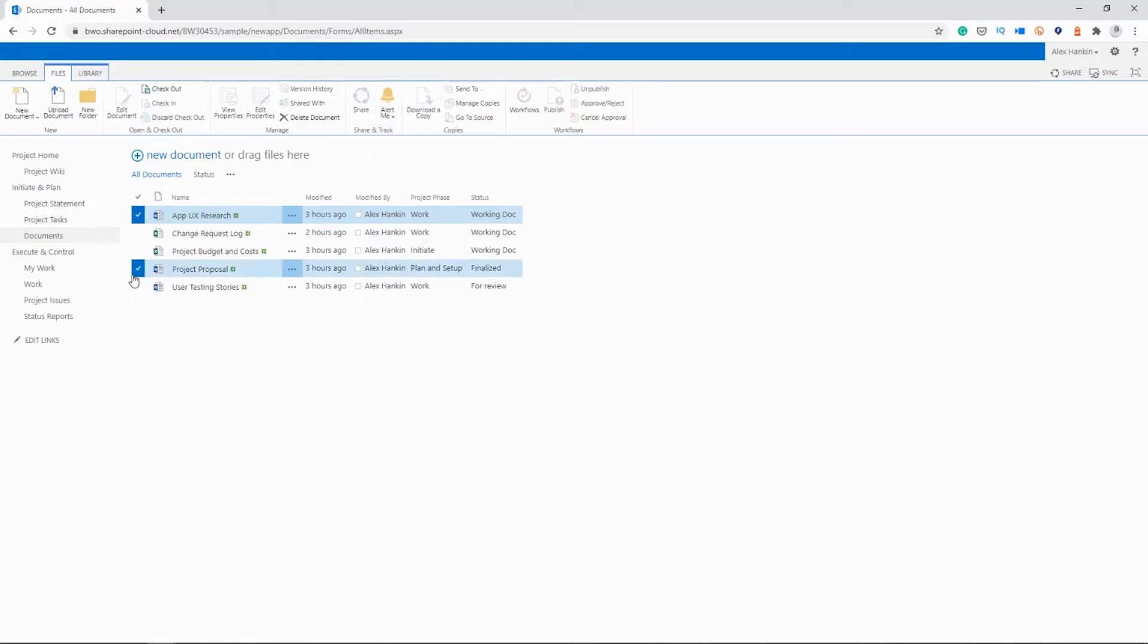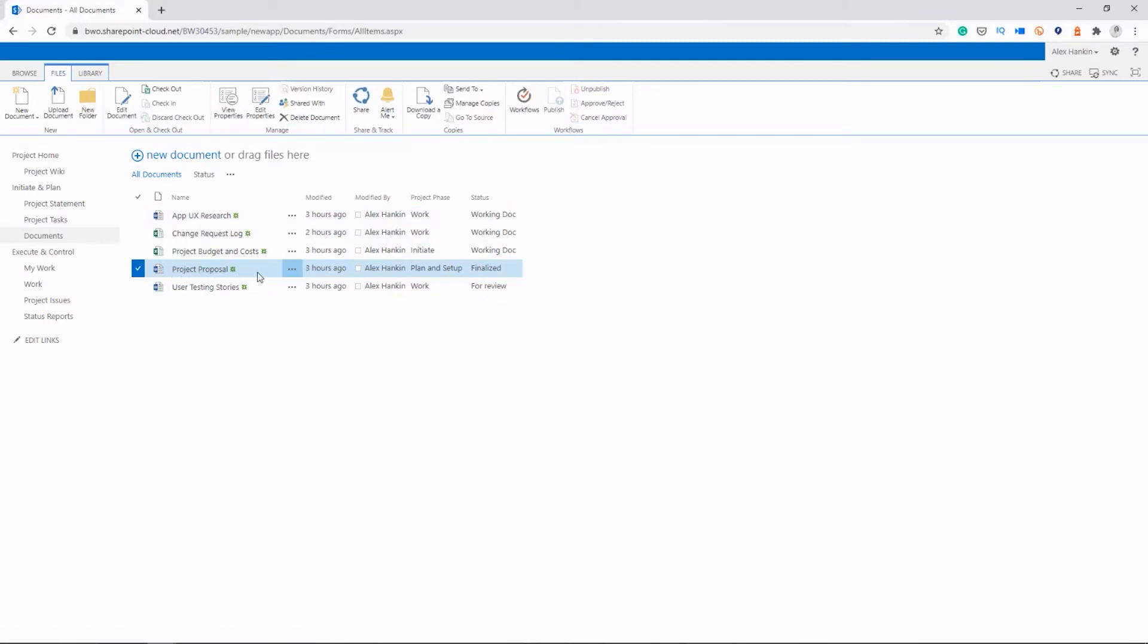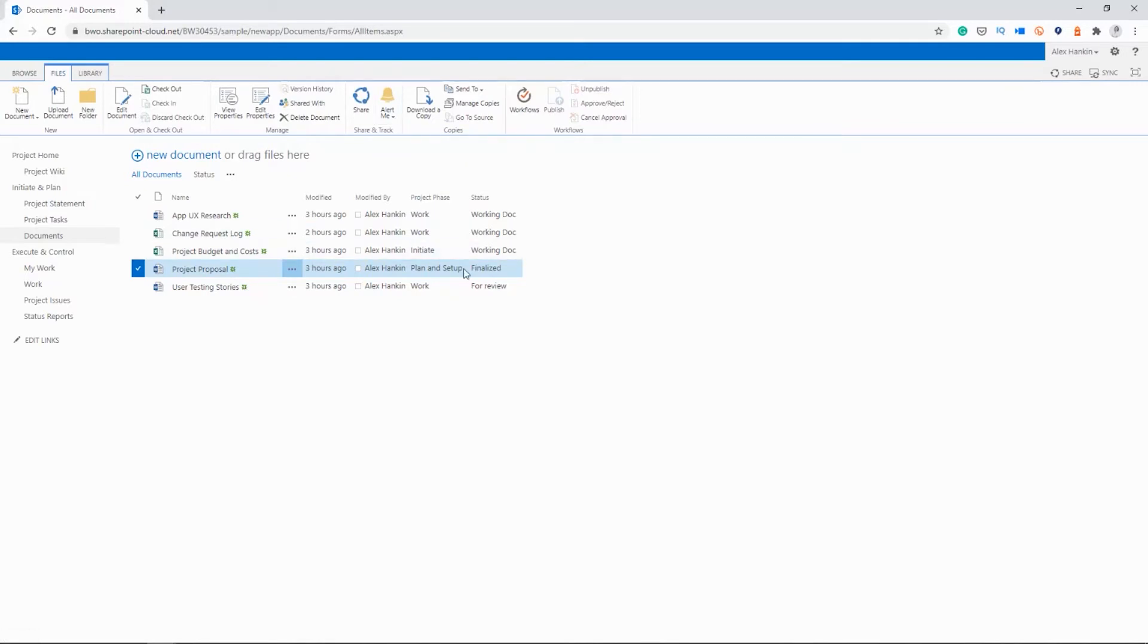So we take our project proposal, for example. This should be finalized when the project starts. It shouldn't be changed. So you can set up an alert to get an email. As soon as that document is changed, you can go into the project site, check the changes. Maybe they're valid. Maybe they're not. And if they're not valid, you can remove the changes or use version control to go back to the original version of the document.